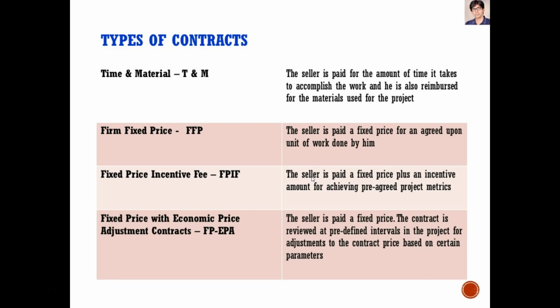So if we had used a contract of a fixed price with an incentive fee for getting it done by August, they would not get the bonus, right? The other side of that is, I have seen contracts that are very similar to this, but not only do they have an incentive fee, but they have a penalty cost also. So in telecom, we did a lot of those because we needed to have things done by a certain date.